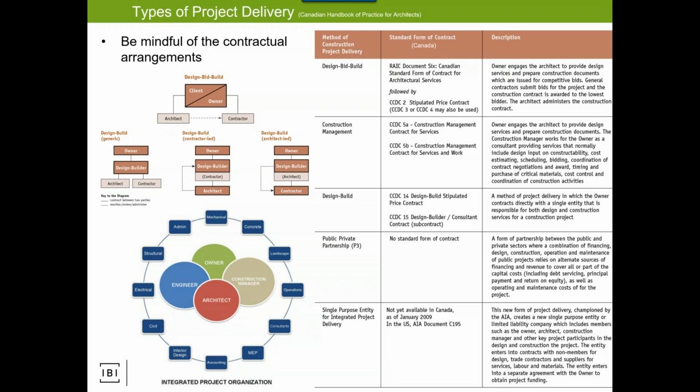The question here from Shay: structural engineer will design the junction or joints, correct? He may not model it. A structural engineer, yes, but might not be the design engineer. So that's why I kept saying the fabricator. The way most likely what you'll see is a beam and a column, a suggestive or a performance-based spec on how the joint needs to be, but the actual design of it would be done by a fabricator. But the fabricator would have a structural engineer that would take professional liability of it. But it wouldn't be done usually by the design structural engineer, if that makes sense.